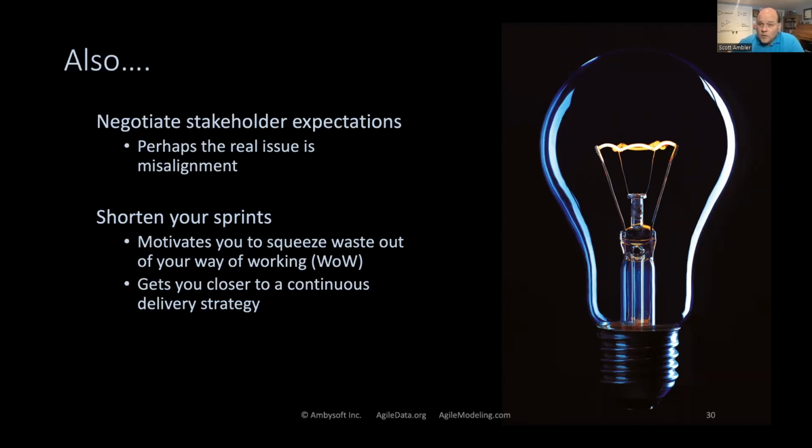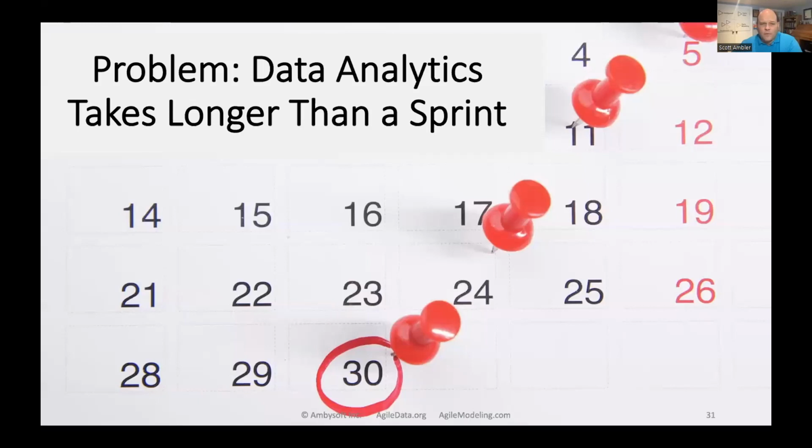So instead of going for 2-week sprints, which a lot of teams prefer, I found that going to 1-week sprints pretty much addresses the issues, right? It's pretty rare to have really high priority things that need to be done right away, but it does happen. But the longer your sprint, the greater the chance of some high priority thing coming in needing to be done right now. The shorter my sprint, the lower the odds of that, right? It's going to happen every so often, sure enough. But if I'm releasing every Friday, telling somebody, here it is Wednesday afternoon, we can get this out the door on Friday. Oh, okay, maybe I can live with that, right? So it depends, but there are different ways.